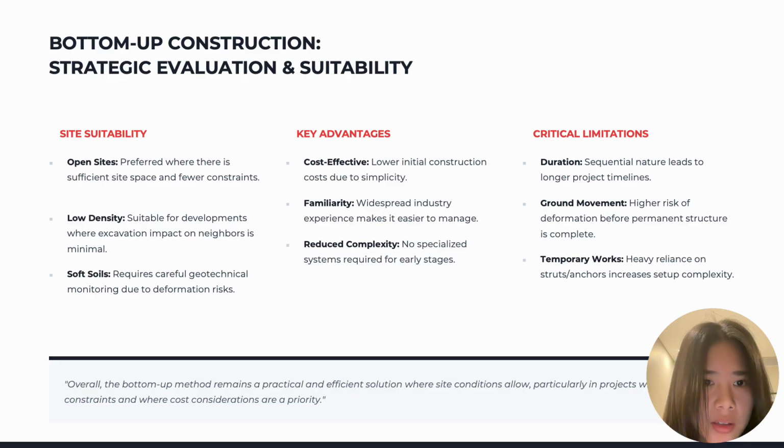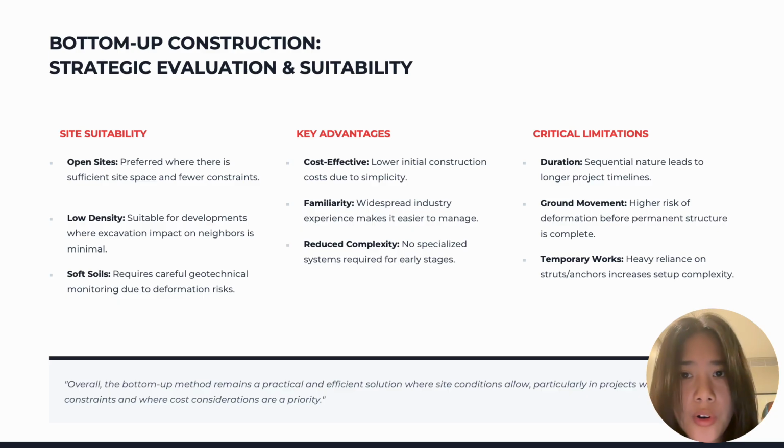These slides introduce the bottom-up construction, the site suitability. In terms of site suitability, this method is mainly used in open sites where there is enough space. It is also suitable for low-density areas where the impact on surrounding buildings is minimal.